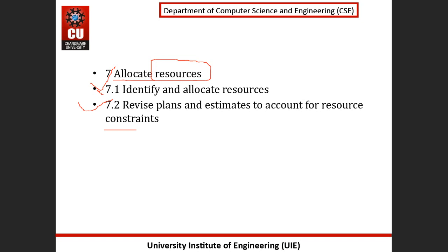Under this, some staff may be needed for more than one task at the same time. Suppose we have a particular resource, but we have two activities to be completed. So which will it go to, which has a higher priority. Fine. That activity will be completed first before the second. But the decisions made here may have an effect on the overall duration of the project, where some tasks are delayed while waiting for the staff to become free.